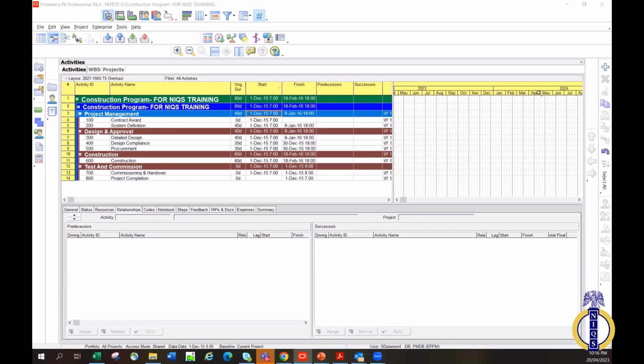As you're excavating, you need to put your earthwork support where necessary, for those in the riverine area, those of us in this part of the world. Sometimes you need the watering machine to remove water from the trenches as you excavate. Then you blind before you put your starter bars. So they have mandatory dependencies. That's what I'm trying to explain.